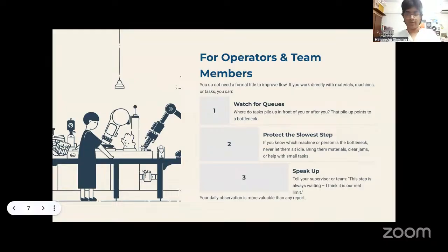That is your bottleneck. In this position, what you can do is you exploit it, you protect it. What we will do, let's do only smoke tests for now and see if with that the time it's taking reduces. You are aiming that it does 10 tests per hour. You measure it, then you evaluate. I implemented this, now is it working out? You see, yes, it is completing 10, no, it's not completing. Based on that, you report it. That's how you can implement it practically.